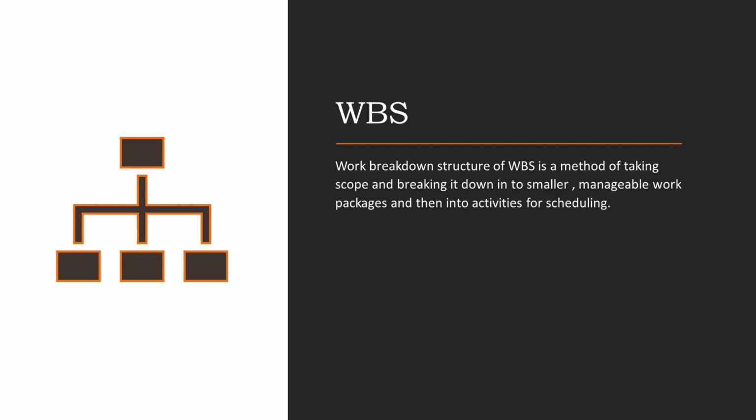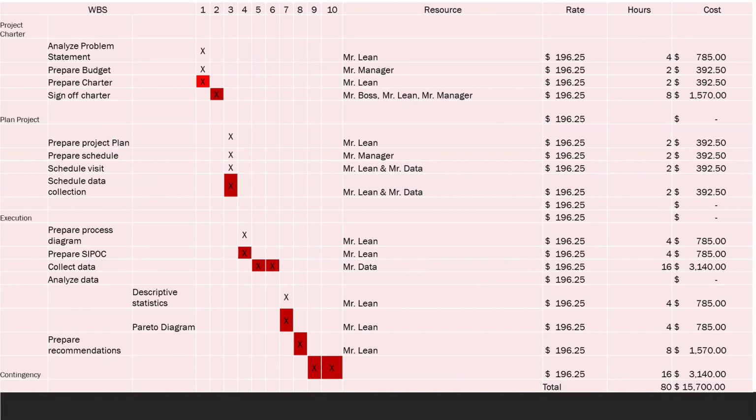However, if you're working on large and complex projects, you should explore Microsoft Project or any other scheduling software. For the project example, I list the activities on the left, and the activities are aligned with the project plan. And as you can see, I use red font to highlight critical path. If you are using professional scheduling tool software, it will calculate and highlight critical path for you.